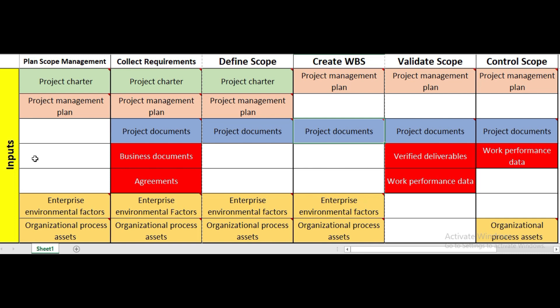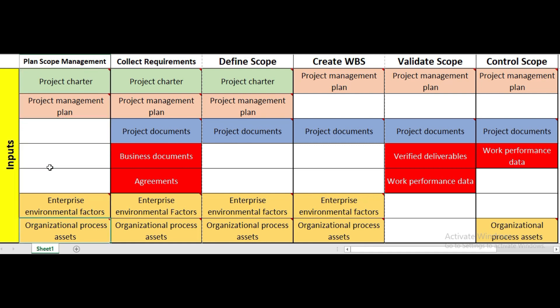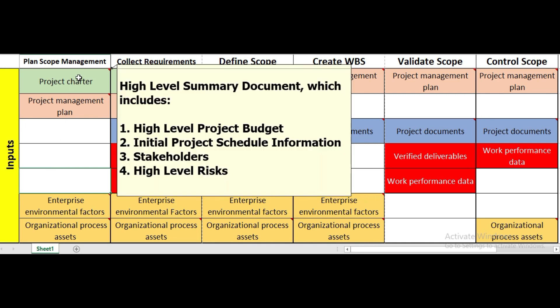Now let's look at the inputs. The first process is plan scope management. In plan scope management, we need project charter, project management plan, enterprise environmental factors, and organizational process assets as inputs — because we need these documents in order to develop the scope management plan. The project charter provides the high-level summary of the project.